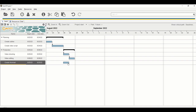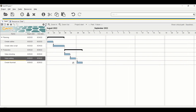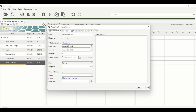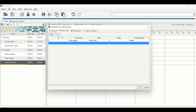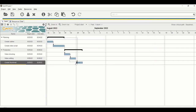For 'Create Thumbnail', it can be done at the same time as 'Video Editing', so we want a Start-to-Start relationship instead of Finish-to-Start. Right-click on the taskbar for 'Create Thumbnail', find the predecessor set to 'Video Editing', click the relationship type dropdown, and select 'Start-to-Start'. Click OK.